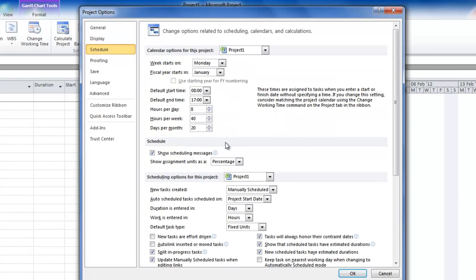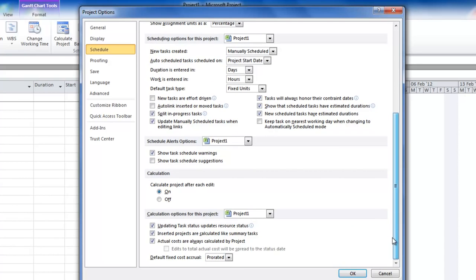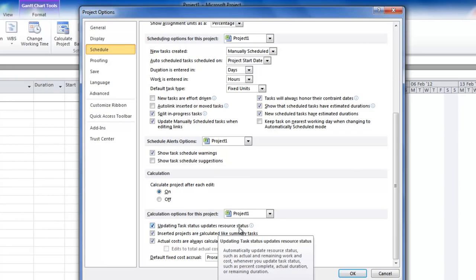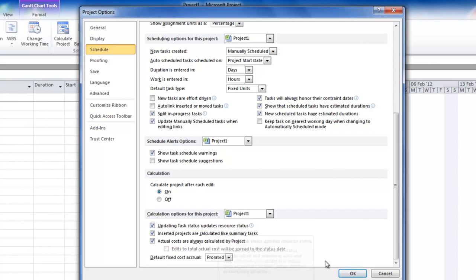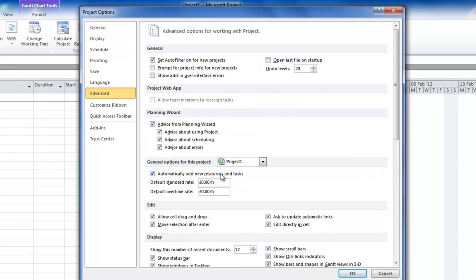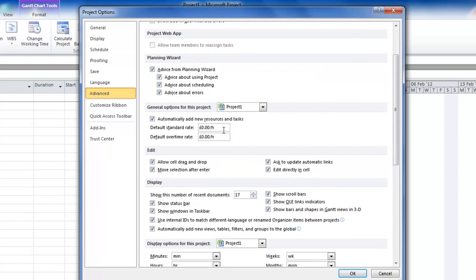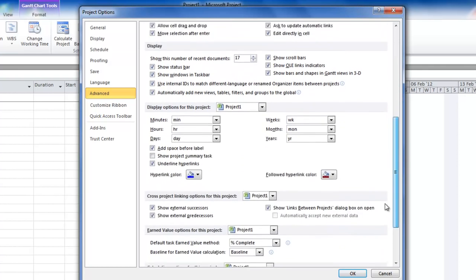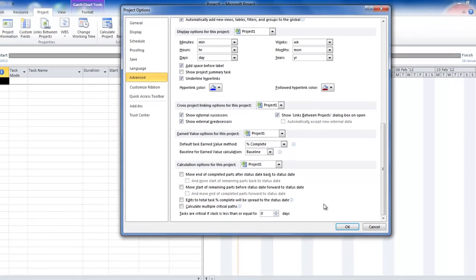The Schedule tab is fairly important — it shows you aspects of setting up the calendar, which I'll do in a moment, and pretty much everything else you can leave as is. I like to check this 'updating task status updates resource status'. That way, when you put a task at 20% complete, it'll adjust the work ratio to the same amount. There is an Advanced tab here — I suggest you leave most of this as it is. You could set a default rate for your resources in terms of how much they're costing you per hour, but other than that you can pretty much leave this as it is.